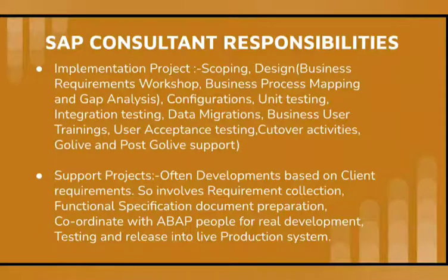Testing here involves regression testing, which is the most important one, because we are involved in developments. Development means the business users want some requirements where the process is already running, and if we are doing some configuration or development, it may impact other functionality also. So impact analysis needs to be done and regression testing needs to be done carefully. Other functionalities or processes should not be disturbed by activating this functional configuration or development. There should not be any disturbance to the existing process. That needs to be taken care of carefully.